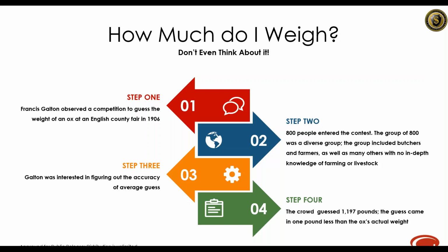And these were smaller data sets, maybe a couple dozen people. In those particular instances, the average guess was not as good as the best guess. Also, for smaller data sets, the mean guess was sometimes influenced by an outlier. In both cases I've seen this, you would get some pretty wacky numbers. The actual number was 100, and one person guessed 5,000, another person guessed 10. So you see these kinds of wacky numbers, and the mean can be influenced by those. So for smaller data sets, the median may be a better option.